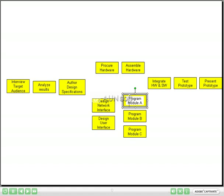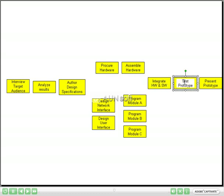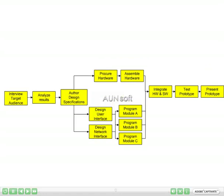Once we have done the network interface and user interface, we can do the programming of Module A, B, and C. Once the hardware is assembled and the programming is done, we can integrate the hardware and software, test the prototype, and present it. Once you put the tasks in order, it is a good practice to connect them using simple connectors. This makes the timing relationship much more obvious and presentable, and it will be easier for you to enter them in Microsoft Project 2003.